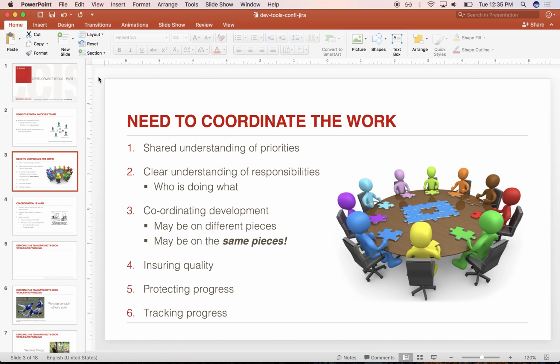Nevertheless, it's very common that folks step over each other, that folks are doing redundant things, and it's a very, very hard thing to deal with. Management often tries to address this with cross-team pollination, where you have folks on one team spend a couple of sprints in another team, just to understand what others are doing and realize, oh wait a minute, we're doing something similar. Could we perhaps generalize some of these tools and use them across multiple teams? So again, coordination is extremely hard work.